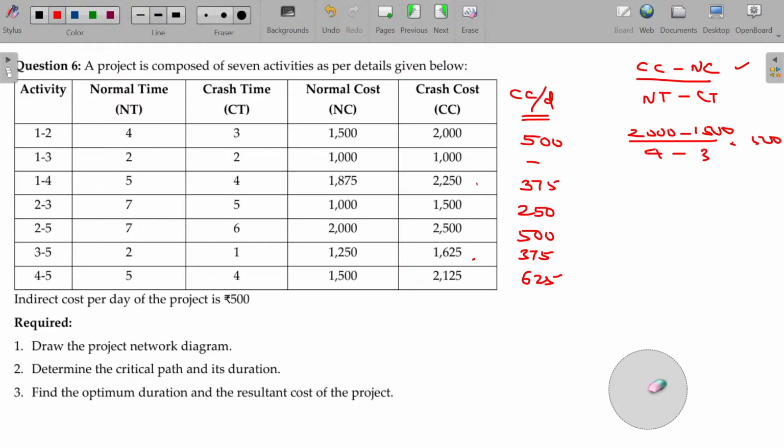That's all. So when I need to complete that work or project in 5 hours rather than 10 hours, I have to put in more effort, or I can recruit additional employees, or I can use additional machines, or I can use overtime. But by using these resources, I need to spend additionally. Now the question is, is it worth reducing the project completion time by spending the extra money? That's the question. So what happens here, I tell you, I can complete the project in 15 days.